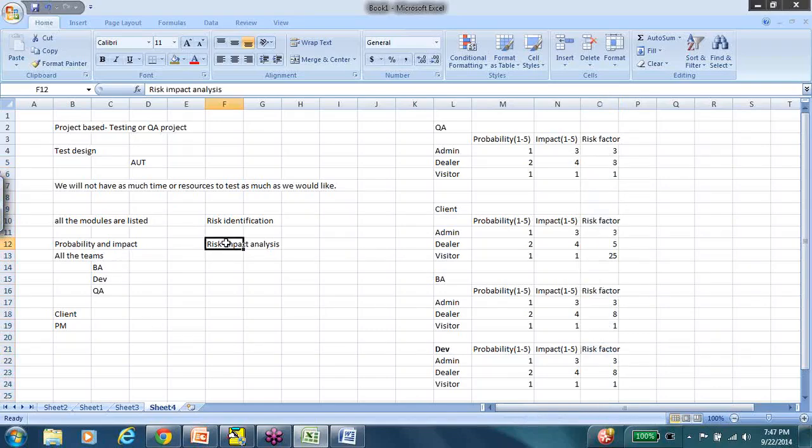So impact analysis is, first assigning probability and impact, sharing it with the teams, and once all the teams have given their ranking, you calculate the risk factor. Based on the risk factor, now I have 5 of them, right? So I'm going to just take an average of all 5 risk factor values that are received from this.